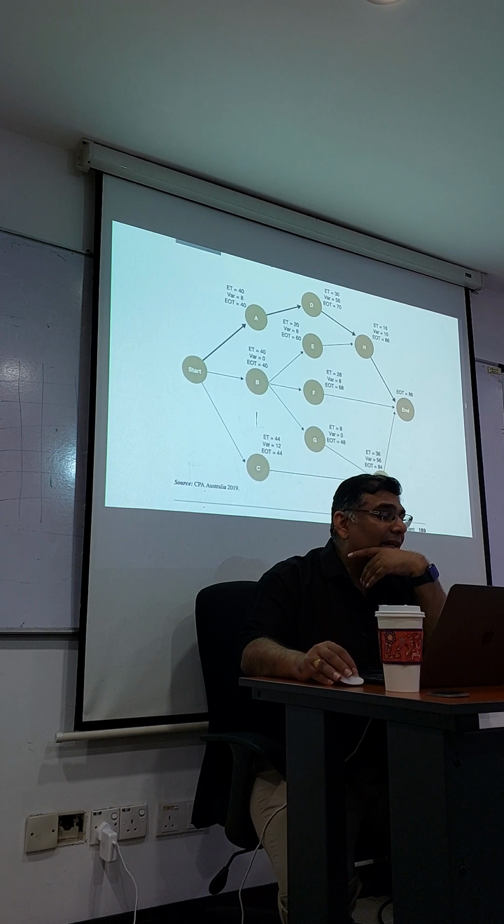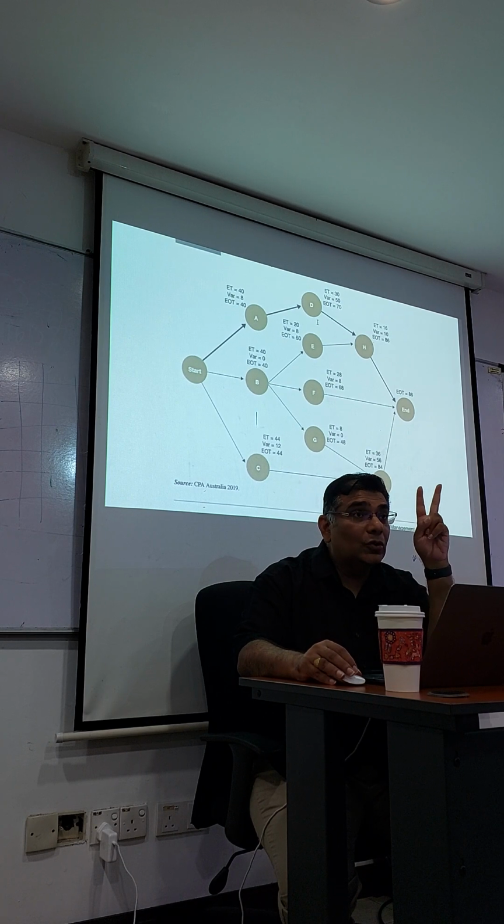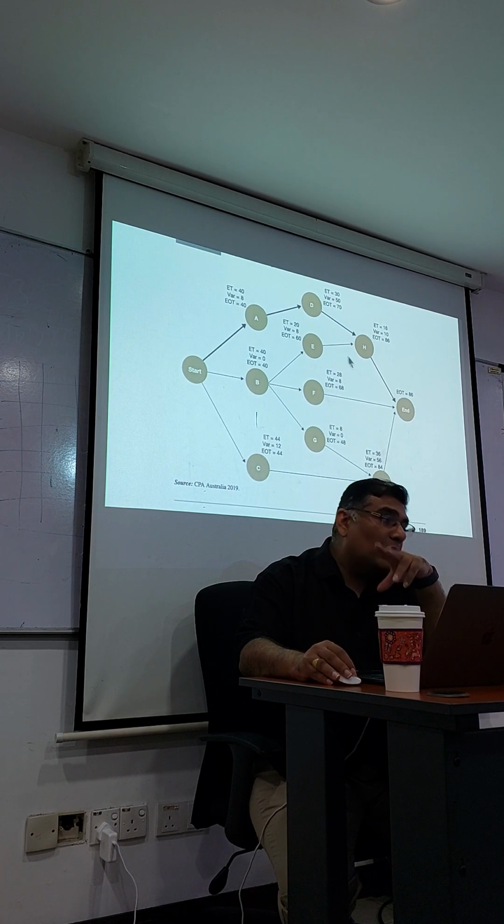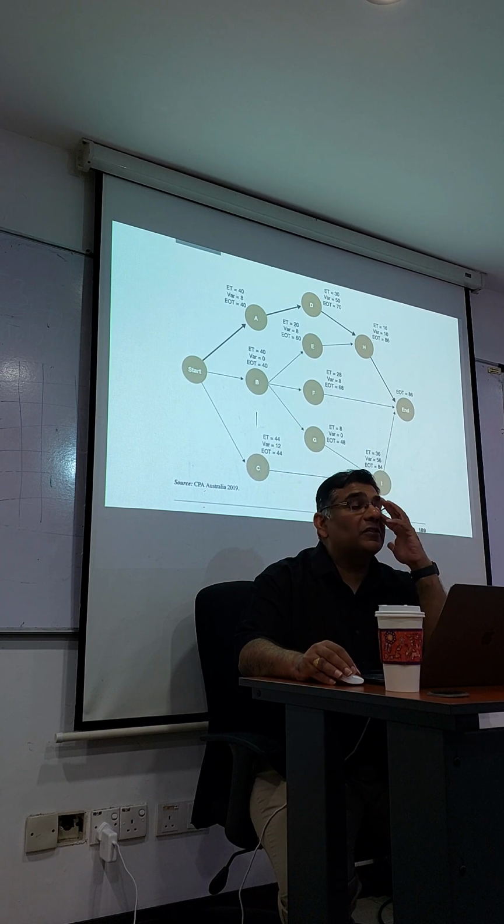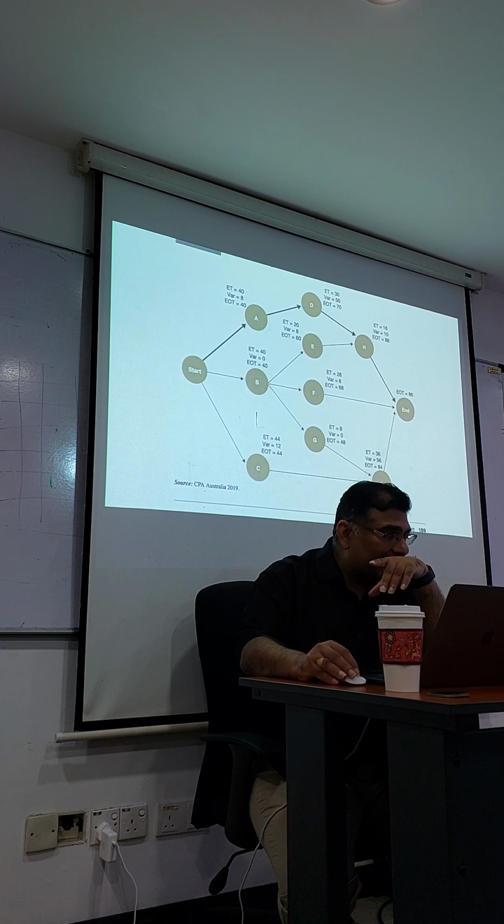Okay, you can see, this one is 84 days, right? Yes. This is 86 days. So the maximum you can crash in this activity is 2 days. Beyond 2 days, cannot. You go faster here, but this one will be late. Does that make sense? Beyond that, you have to start crashing activities in this line already.